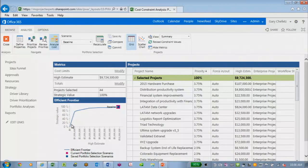Well, the only way you're going to do that is show them the numbers. And that's what I did. I said, here's the net present value, here's our current burn rate. And by the time we get 6 months down the road, unless we can drastically change this thing, we're wiping out all the value of this project, so let's kill it now. Either that or let's change it radically. And showing them these numbers, you can get a project killed. It's very hard to kill projects in most organizations.